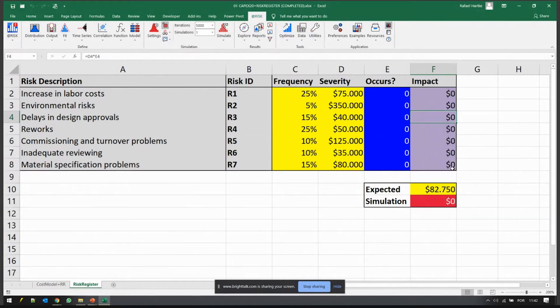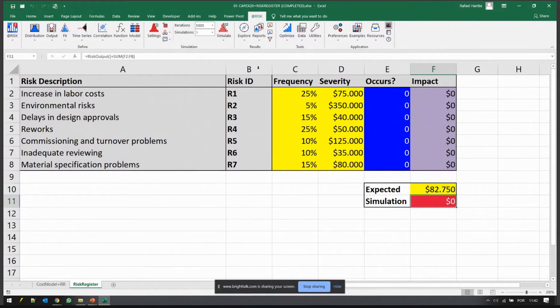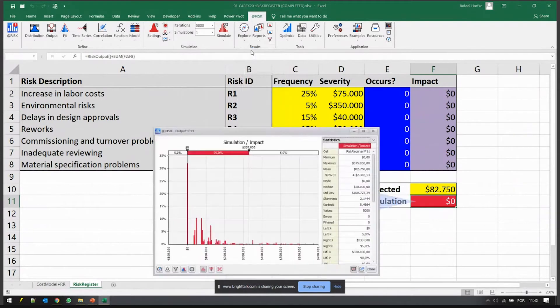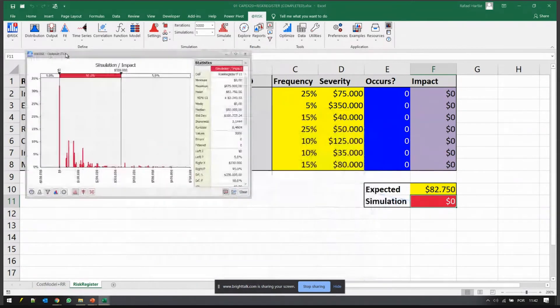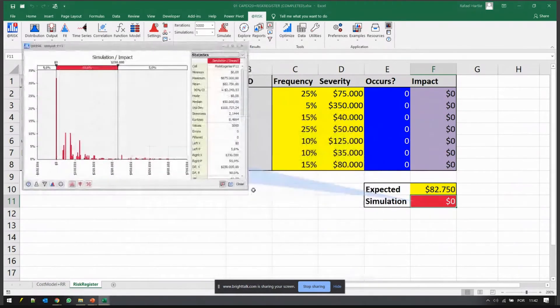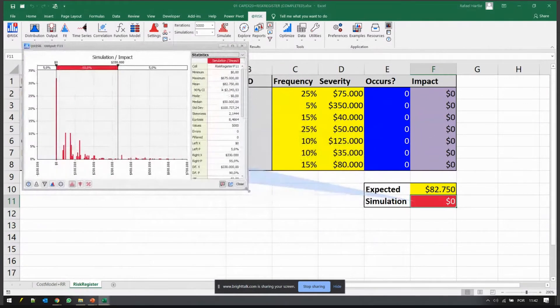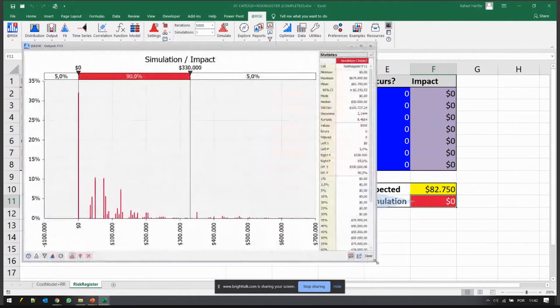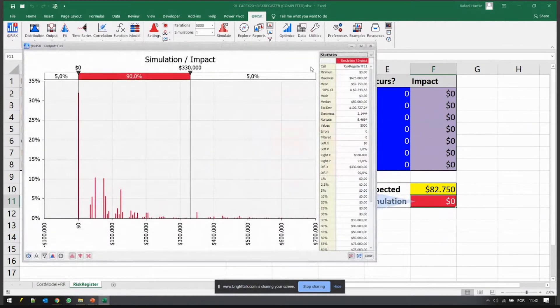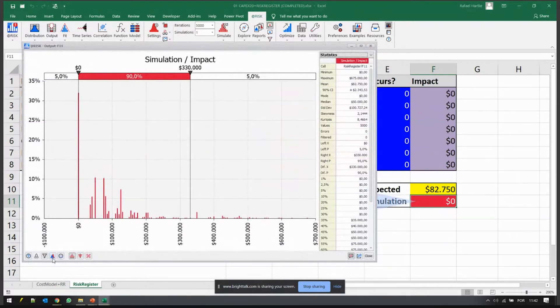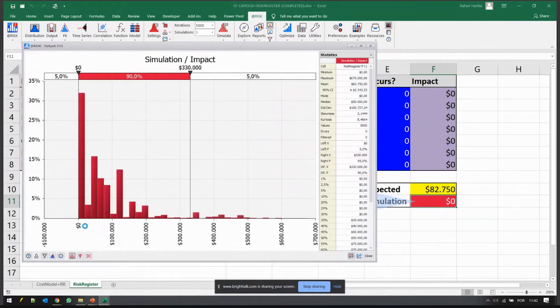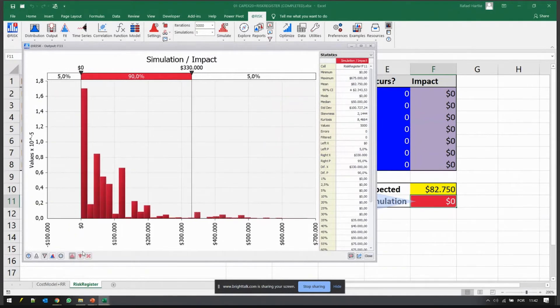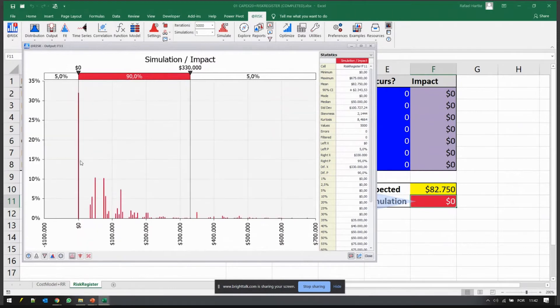What we do with the simulation is now we evaluate the distribution of this result. This is an extra cost that my project might incur and it has to be included on my budget, on my contingency plan. From this distribution here, there's a chance that we will see no cost at all.